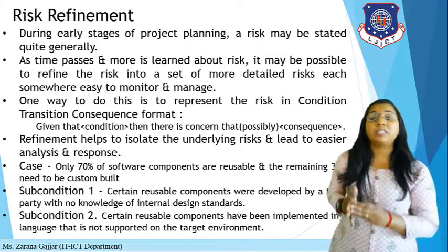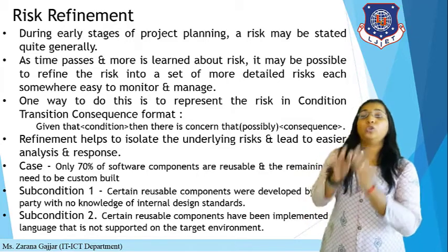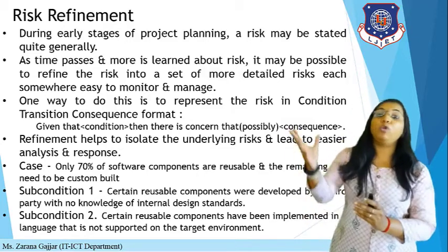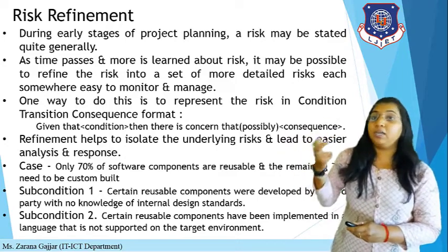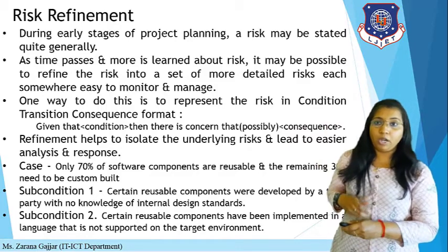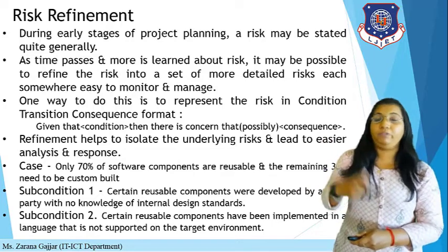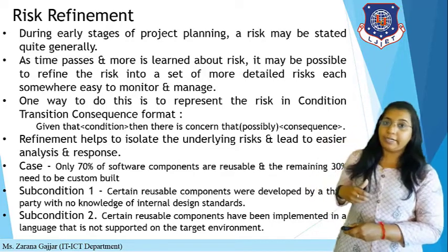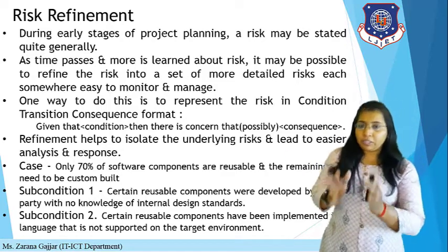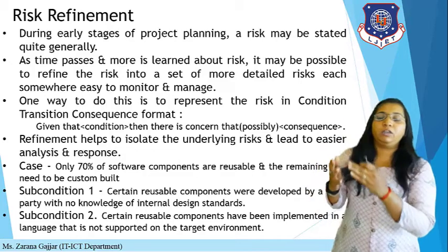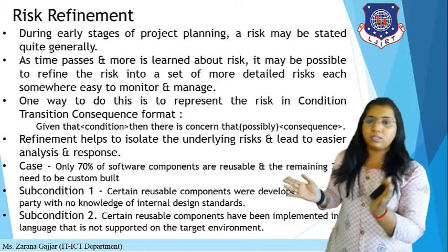Now let's discuss risk refinement. You have already identified the risk, and you have also estimated the risk cost. Now you have to refine the particular risk. During early stages of project planning, a risk may be stated quite generally. As time passes and more is learned about the risk, it may be possible to refine the risk into a set of more detailed risks, each somewhat easier to monitor and manage. If the customer gives you some requirements, then based on them you analyze which are feasible, and you finalize the customer requirement.